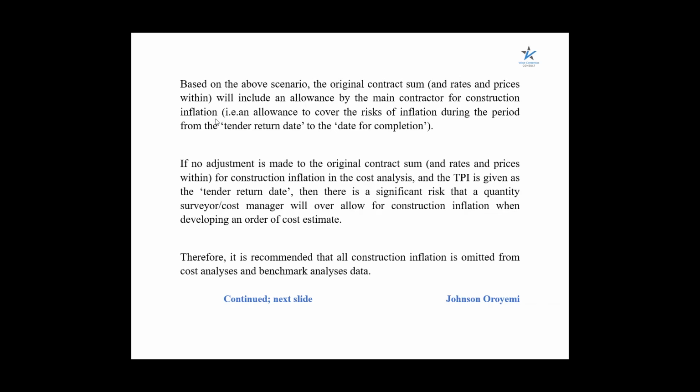Tender inflation simply means that you are allowing for an increase in the cost of material or an increase in the cost of inputs of a construction project from the date of preparation of the priced bill of quantity, or let me put it, from the date you are carrying out building up rates for that particular project to be used in your bill of quantity, and the date the tender will be returned. So that's what we call tender inflation.